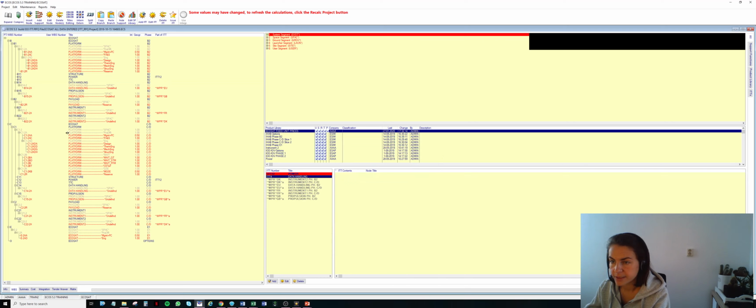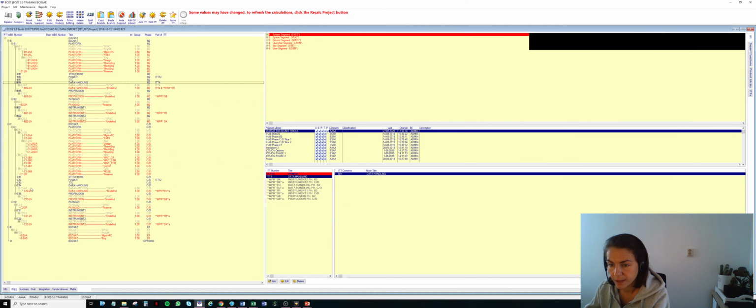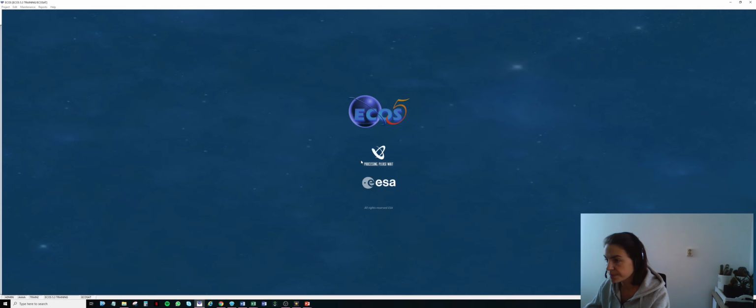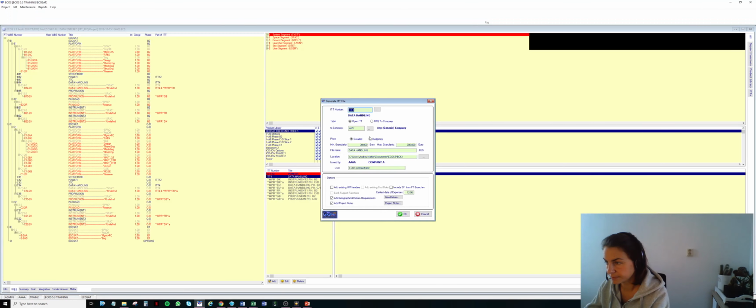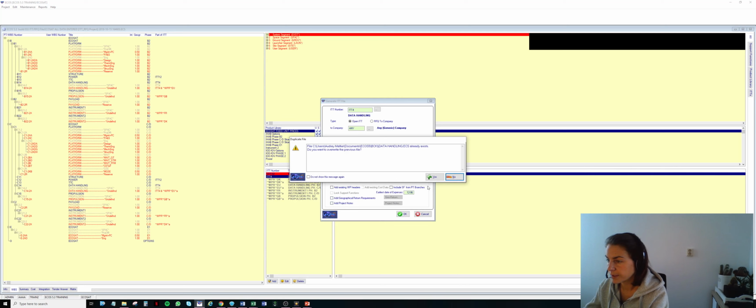So I can find it in my list here, and you remember just by dragging and dropping the related nodes in my ITT content, I can here issue a new ITT. So this is the ITT 4 that will be placed in my BCK directory. The user as AAAA. Okay.